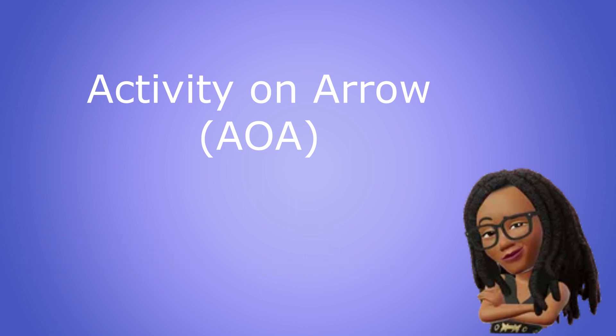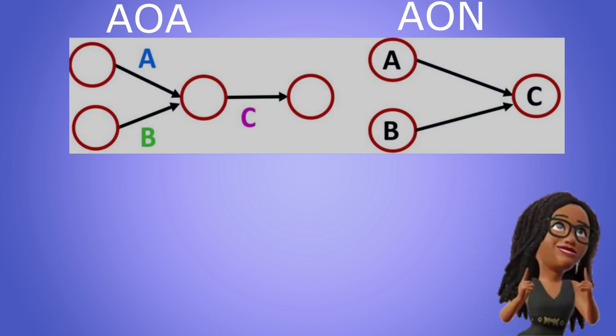Let's see what that looks like when we compare an activity on arrow network to an activity on node network. As you can see this particular project network has three activities A, B and C. In the first diagram the activities are represented by the arrows while the nodes show where each activity starts and stops. In the second diagram the activities are represented by the nodes while the arrows show what activities come next.